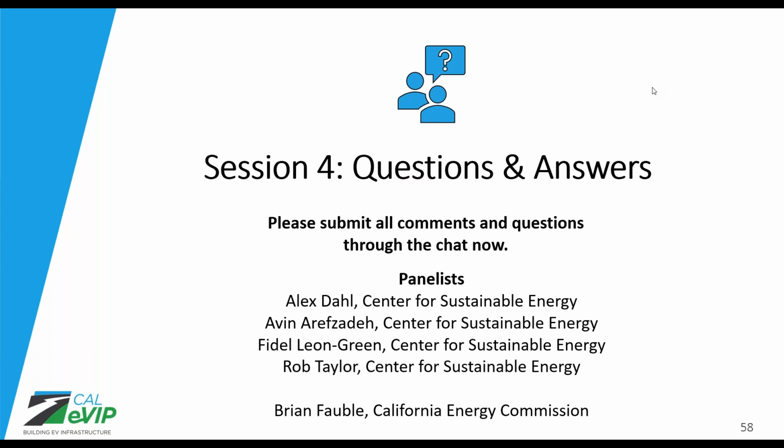Perfect. And then someone from the team with this one, if funds are approved for an application, but the site host decides to cancel, are we able to use the funds reserved for another application they have in the queue? No, so once an application has funds reserved, the funding is reserved for that specific application. And if that application cancels, then the funding would return to the project and would be used in a subsequent funding release.